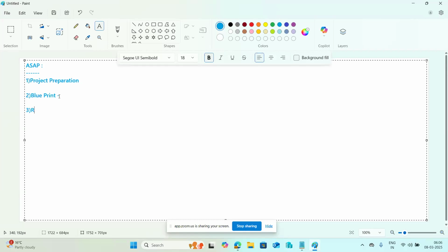Then comes the realization phase. As a technical consultant, especially for Basis people, this is where we start downloading the software, installing the databases, and installing the application on top of the database. Then we do the initial configurations, build the quality systems, and hand over the development system to the developers, who start the development.